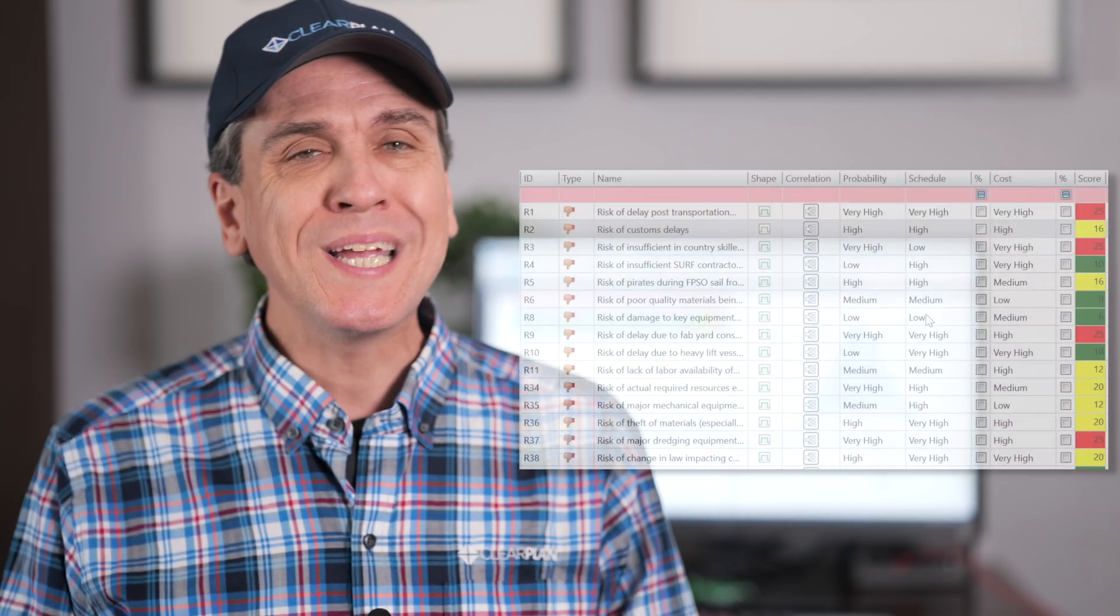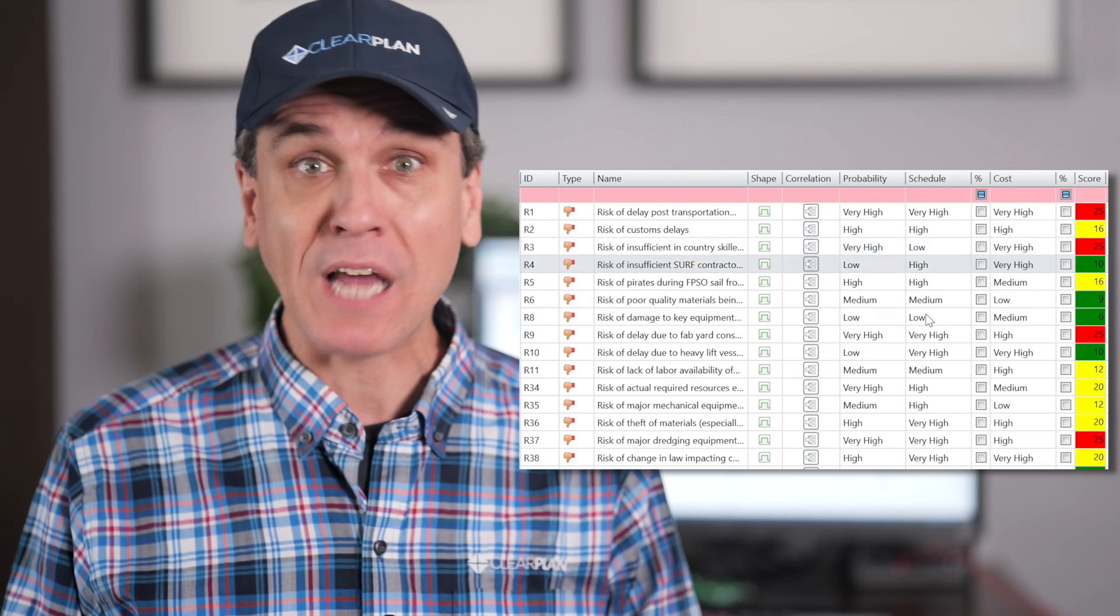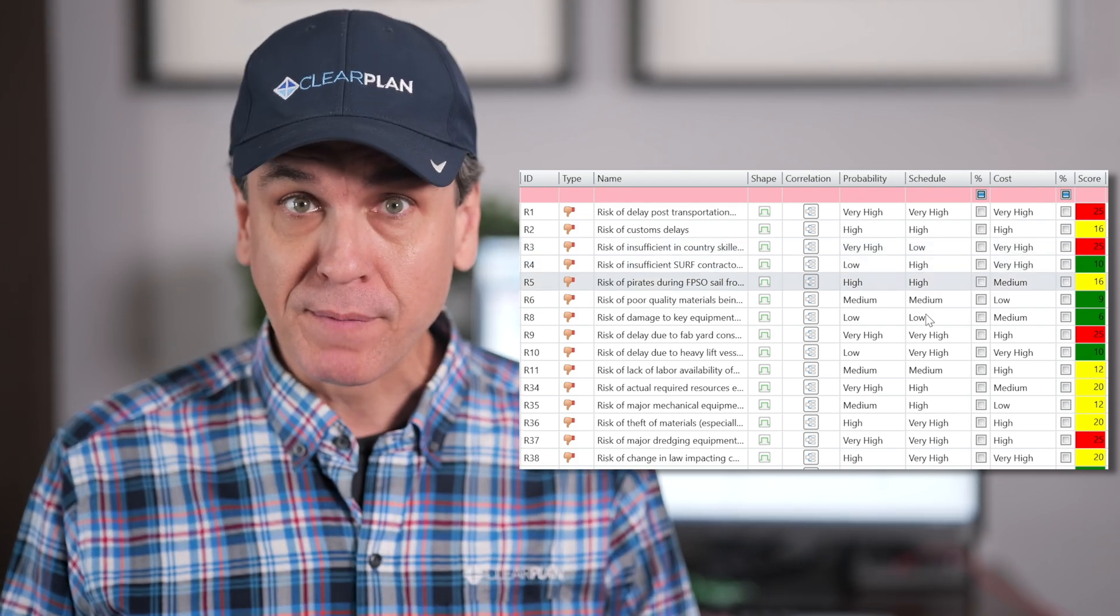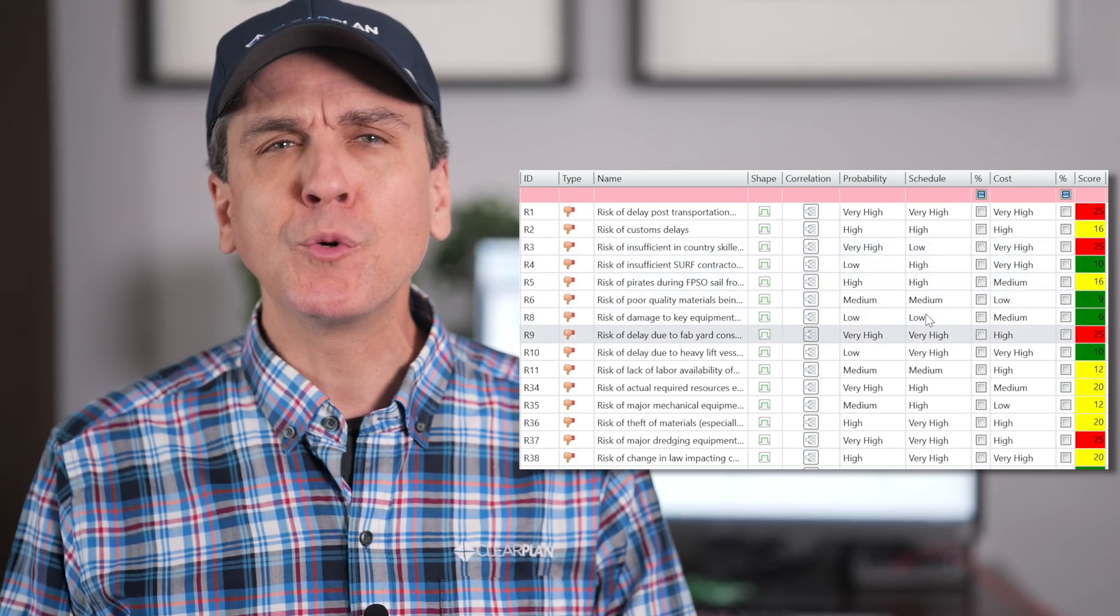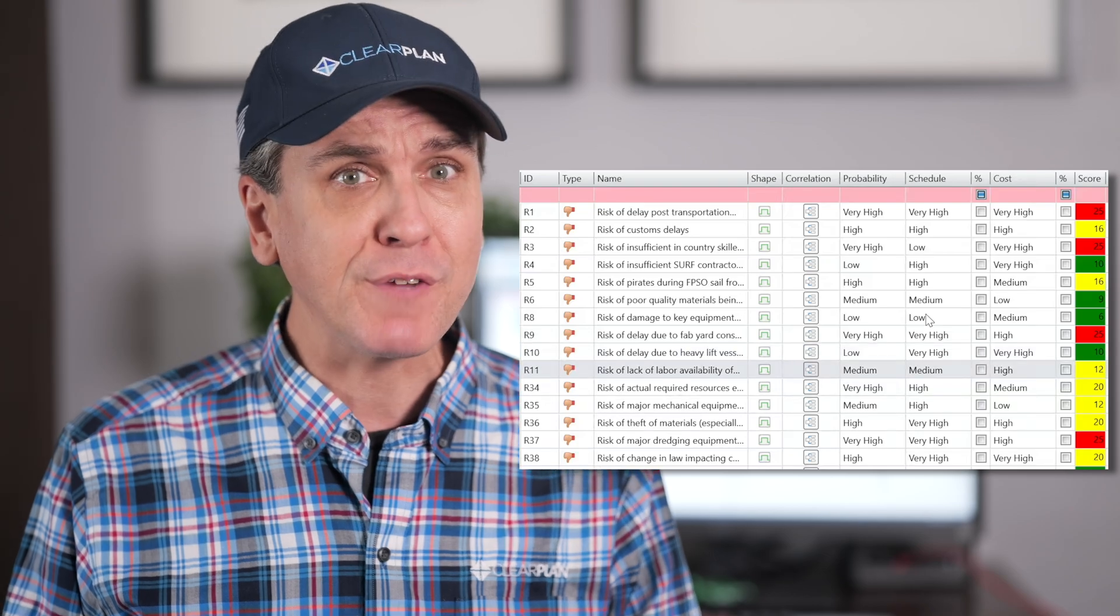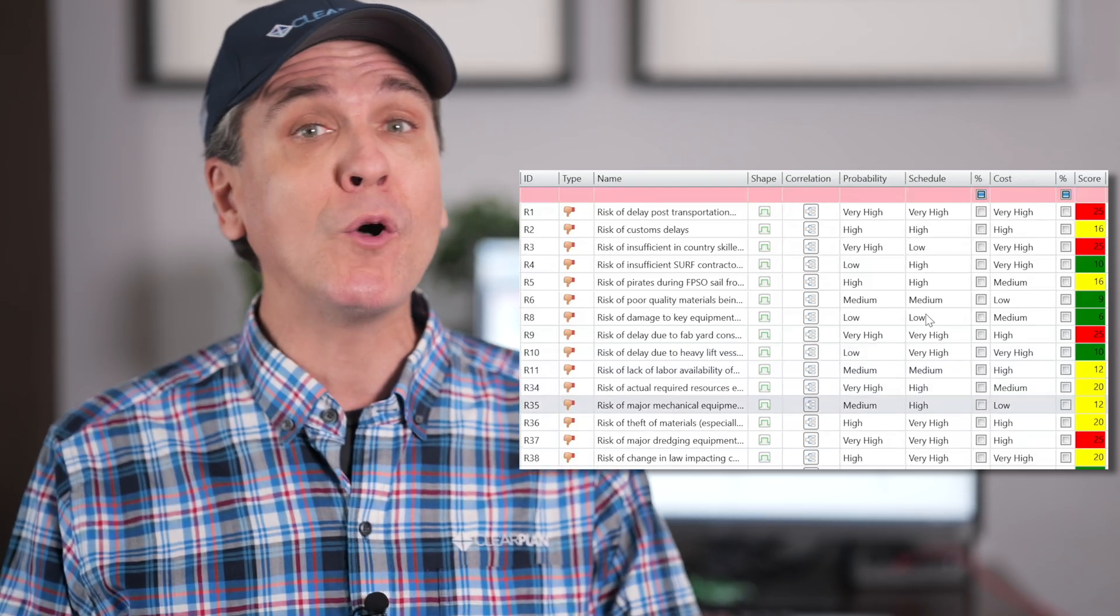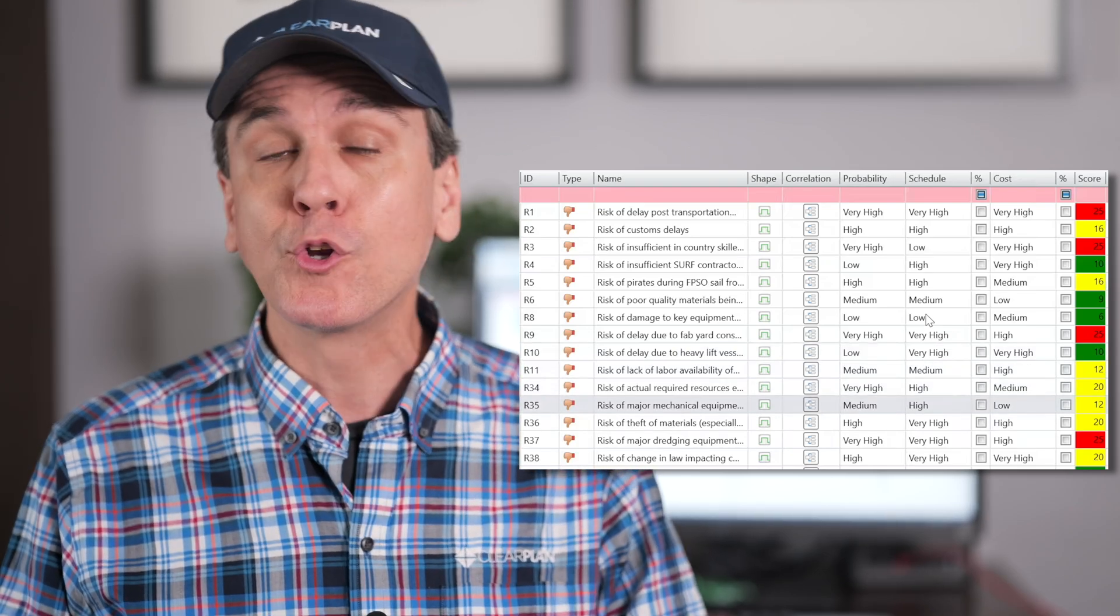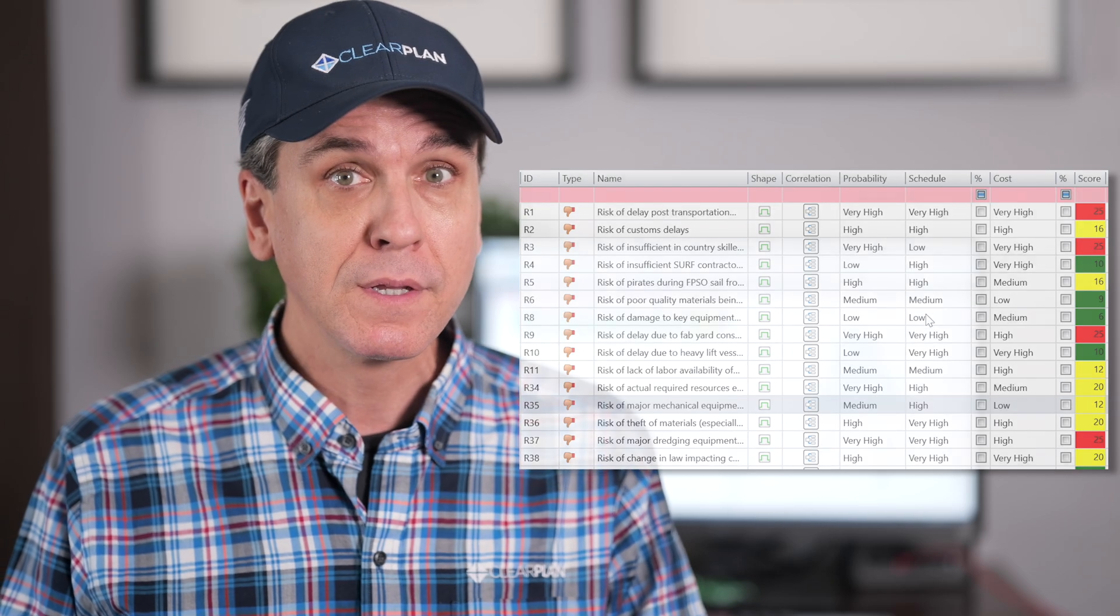Another common set of inputs are risk register events, discrete and named threats and opportunities. These are risk events that refer to a series of distinct events that can and maybe will happen during project execution. These work best in software that allows risks to be mapped directly to the areas of the schedule that they are most likely to impact.